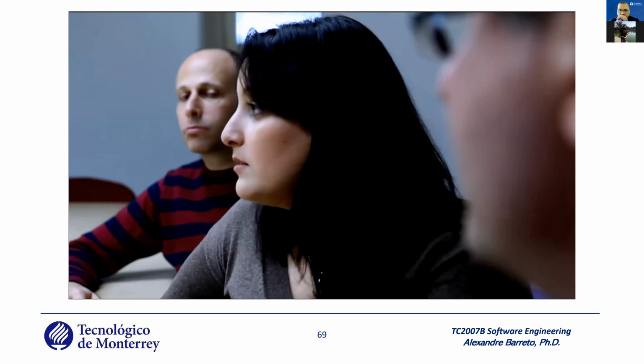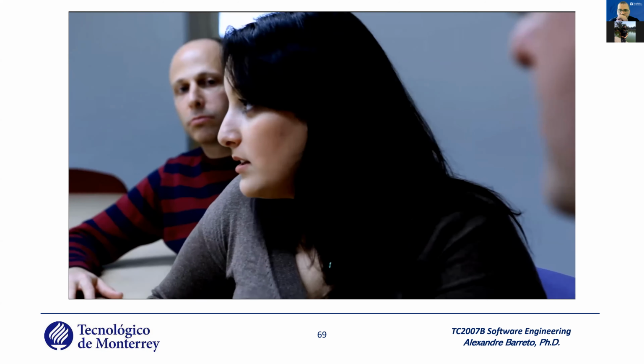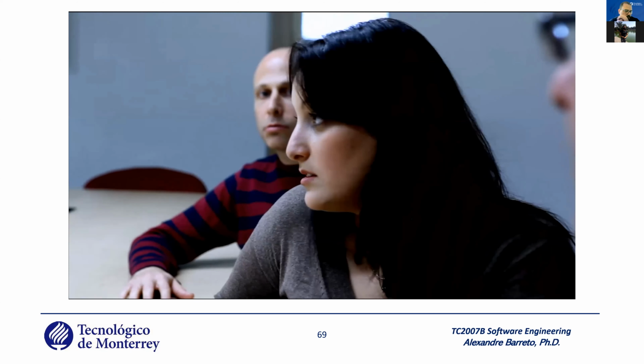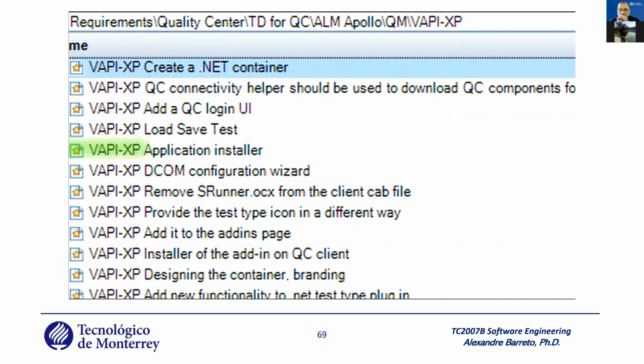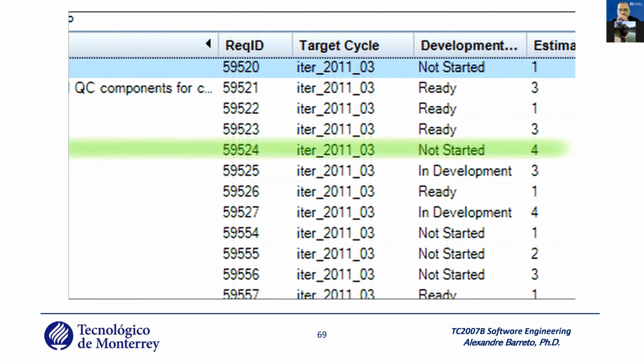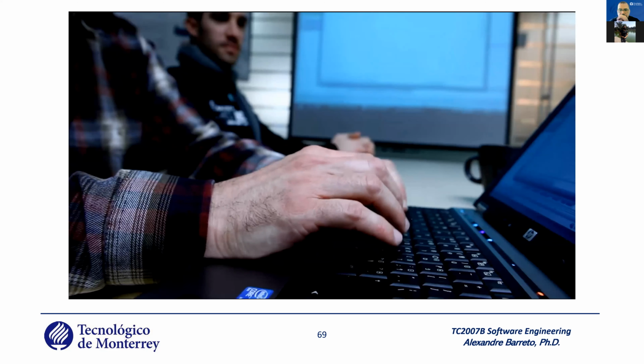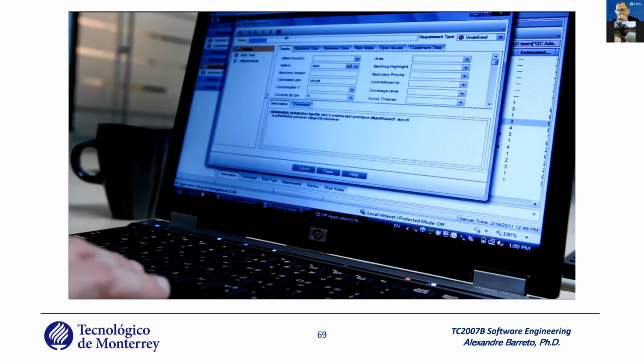I agree, but I think we can look at the backlog items and see what we can push on to the next sprints that has low priority. Rev, you know the content very well. Can you suggest something to remove? Yes, application installer is on a lower priority, so I think we can push it ahead to the next sprint if you all agree on that. Yeah. Do you agree? Yeah. Okay, I will update the backlog.